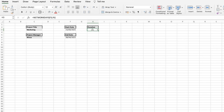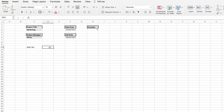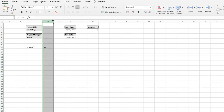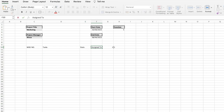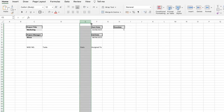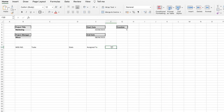Once you've laid out your key information, you want to begin adding your task fields. I like to add a number column first, then a task column — making it slightly larger — then a status column, an 'Assigned To' column, and depending on your project, a start date, end date, and duration column for your tasks.